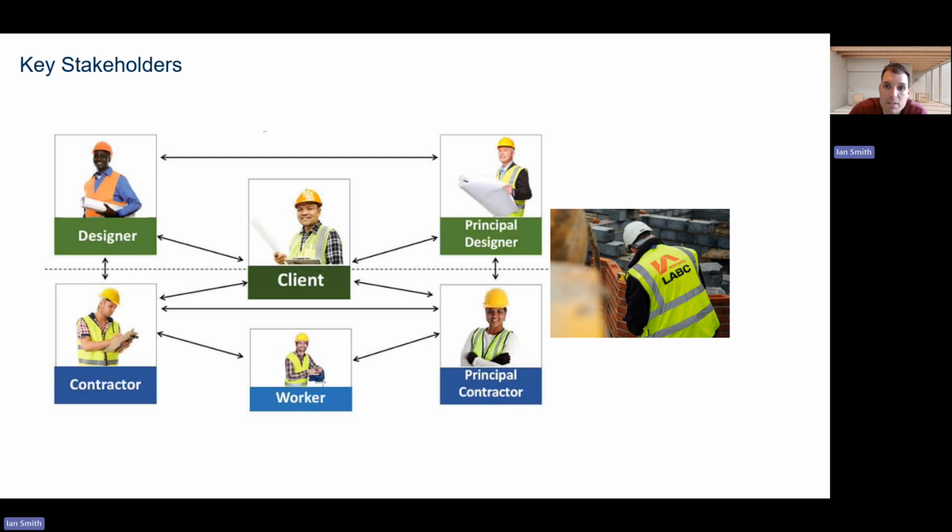Our principal contractor, another key duty holder under CDM, is responsible for managing the construction phase and coordinating all contractors working on site. They develop the construction program, a Gantt chart, which we've seen, manage resources, and ensure safety procedures are followed. So we are currently working for the principal contractor. Our principal contractor is critical because they oversee the day-to-day organisation of groundworks operations and ensure the work progresses according